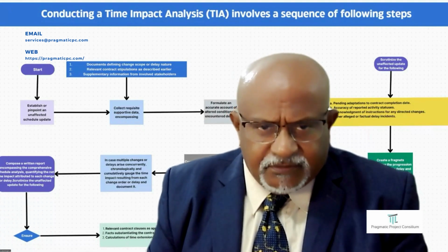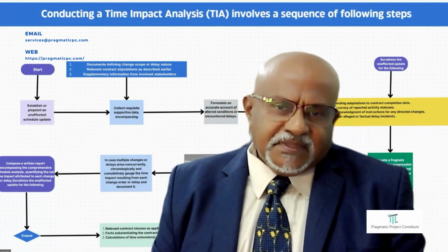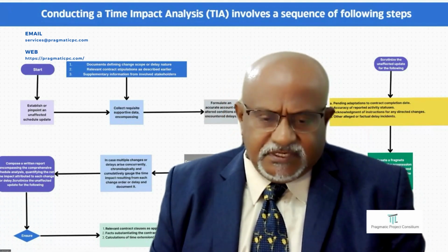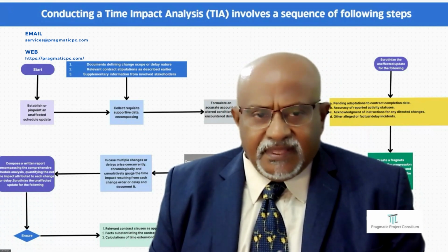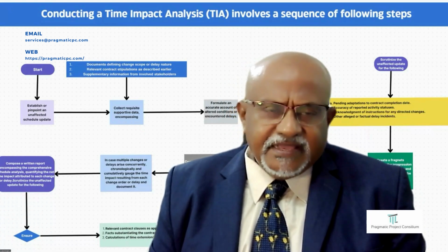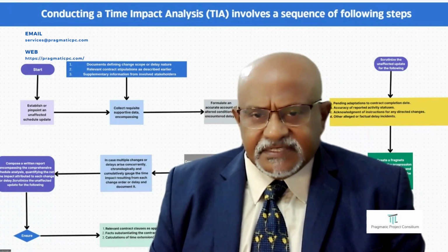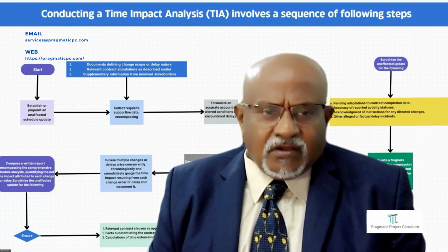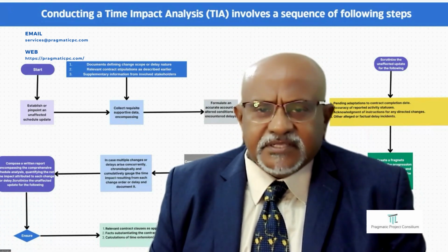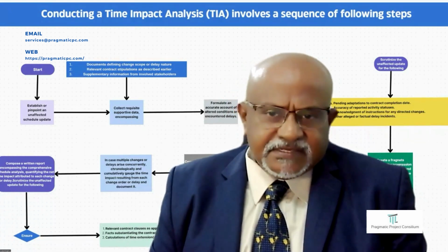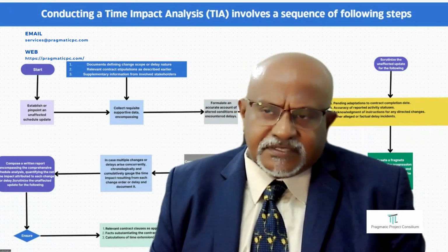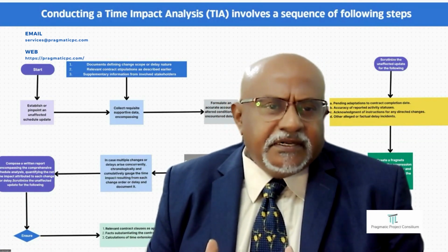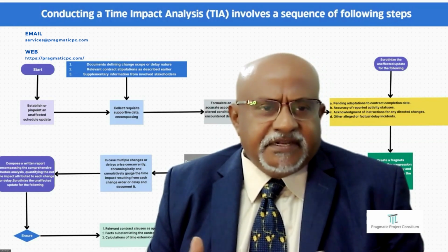How does the contractor arrive at the methodology selection? The decision often hinges on the project's available source documents, the source validation data. The windows or TIA, the time impact methods, necessitate at minimum a baseline, and for certain techniques, contemporaneous schedule updates are very much required. In contrast, the collapsed as-built for certain methods draws from the project's daily records and impact data,